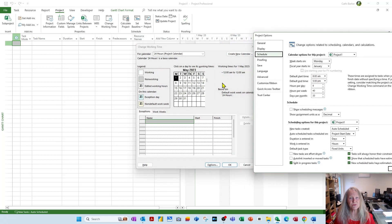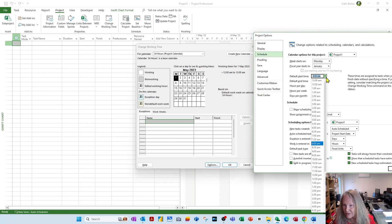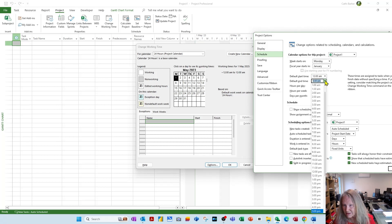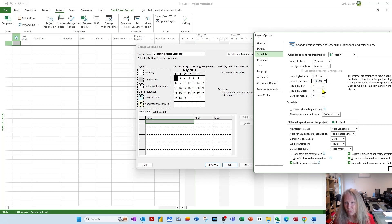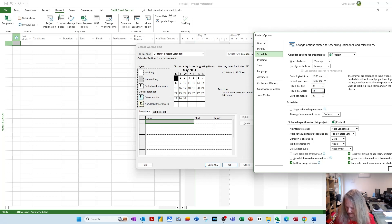So I'm going to set my start time to 12 midnight, my end time to 12 midnight. I work hours per day 24, and hours per week is 168, 24 times 7. So make sure that those 1, 2, 3, 4 options are correct.